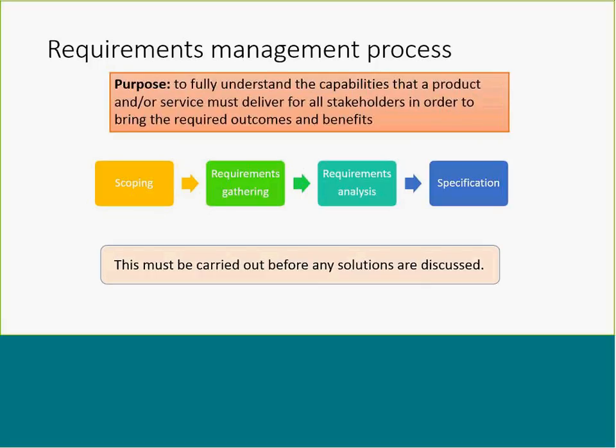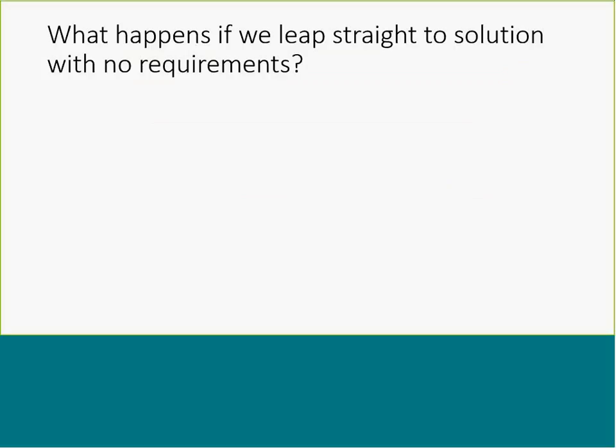I use the software development life cycle and go through each of the stages, but I think that requirements are actually about understanding the capabilities that a solution must have. And requirements management is a process. You don't just do it at the very start of the project. It's an ongoing process throughout the life cycle. I can go through these areas in detail. I haven't done that today, but I'm very happy to share those slides with anyone who's interested. And always stressing that this must be carried out before any solutions are discussed.